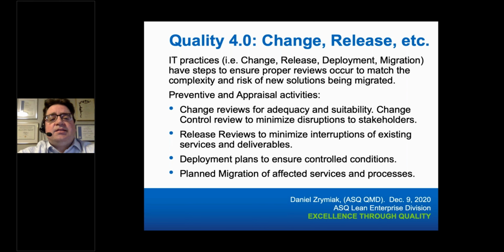Change and release. Again, this is very well structured in organizations that frequently do innovative solutions. They do so under change management, where the purpose of the change is communicated to the stakeholders who would be affected by that change, and then not just whether they'd accept it, but also the timing of when such changes would occur. So for example, if you're changing accounting software, you don't want to do it immediately before your fiscal year end, so that in addition to the other work, it provides an unwelcome distraction. So looking for peak periods and slow periods, and understanding when such a change could occur with minimal disruption to the business.